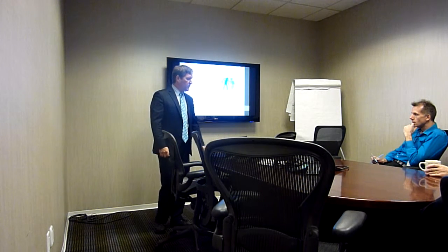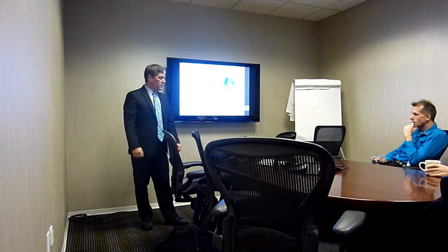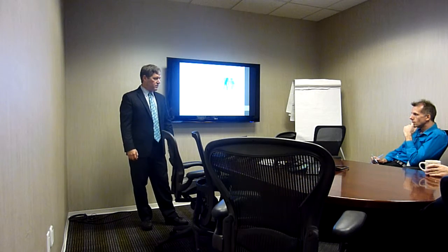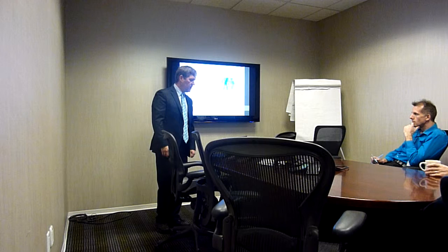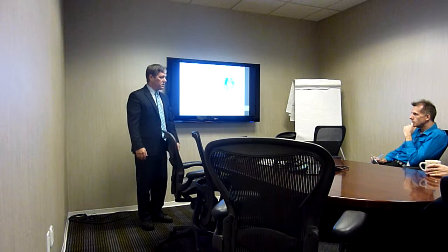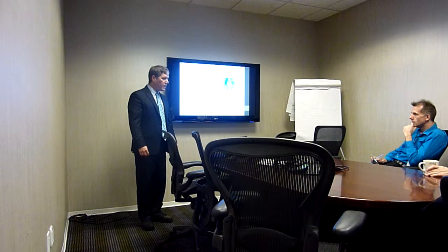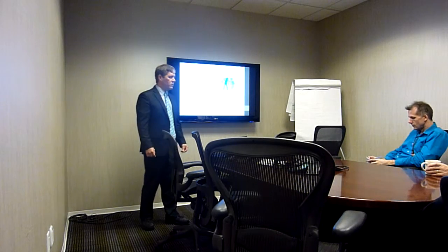Collaboration should ideally be done 1 hour for every week of development, and it can occur in the sprint planning or retrospective processes or any other discussion and debate meetings. And it's a process of continuous improvement, as I talked about earlier.